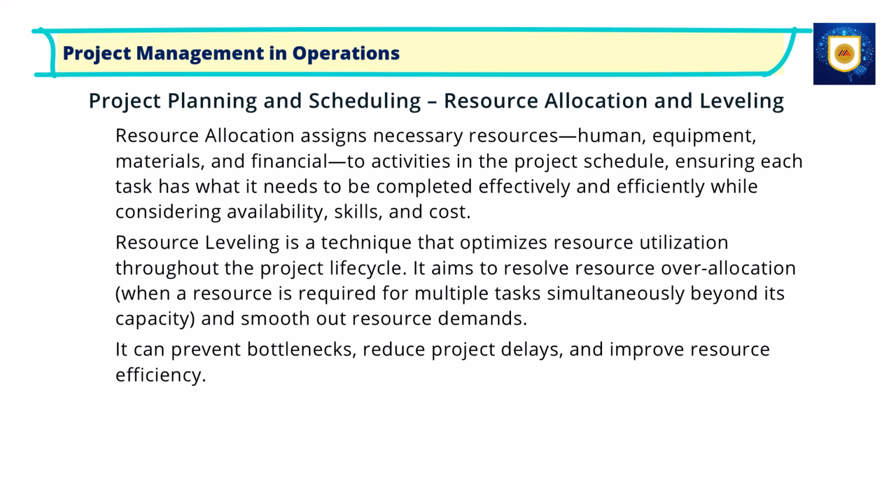Resource allocation assigns necessary resources, human, equipment, materials, and financial, to activities in the project schedule, ensuring each task has what it needs to be completed effectively and efficiently while considering availability, skills, and cost. Resource leveling is a technique that optimizes resource utilization throughout the project lifecycle. It aims to resolve resource overallocation, when a resource is required for multiple tasks simultaneously beyond its capacity, and smooth out resource demands. It can prevent bottlenecks, reduce project delays, and improve resource efficiency.